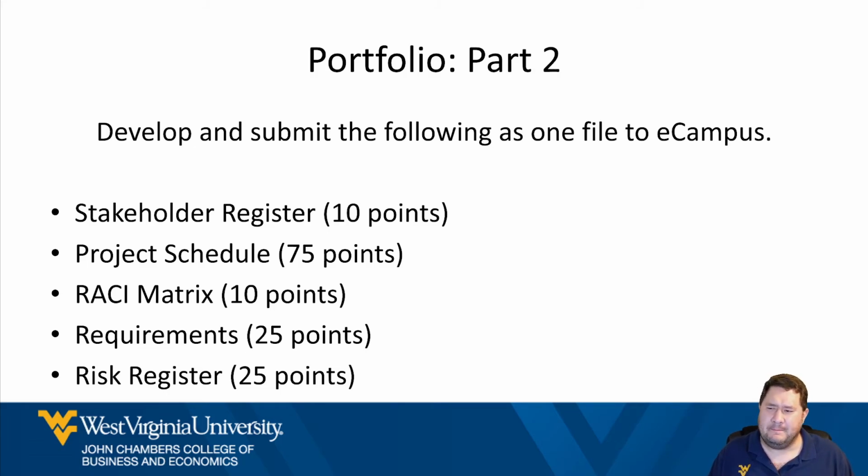Project schedule. Come up with a little bit more detailed project schedule. So your work breakdown structure, start looking at that and see how long things are estimated to take, and come up with how long it should take overall. And remember the relationships between your various tasks too. Not all of them are going to be one finishes, the next one starts. Some others might be this one starts and the other one starts at the same time for certain things.